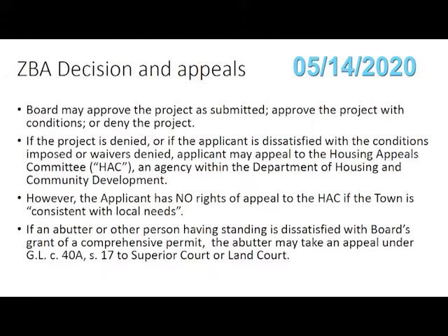When the developer appeals the Board of Appeals decision, it goes to the Housing Appeals Committee and it starts de novo. Meanwhile, an abutters appeal, if there is one, is just sitting out there literally on ice until after the Housing Appeals Committee matter is resolved, either at the Housing Appeals Committee or in Superior Court or in the Appellate Court. And that's what could take years. So years later, after that's resolved, now we still have this abutter appeal.